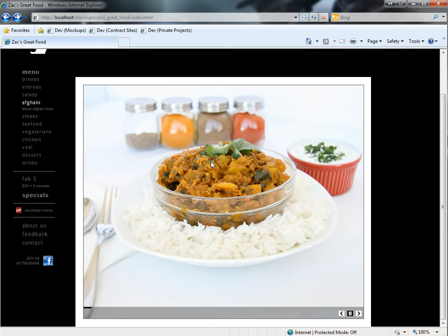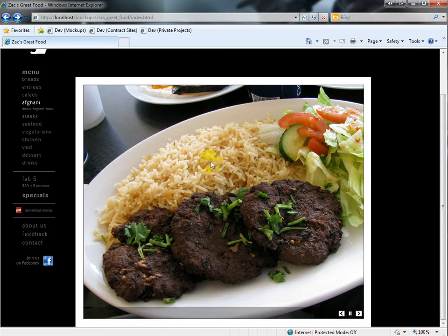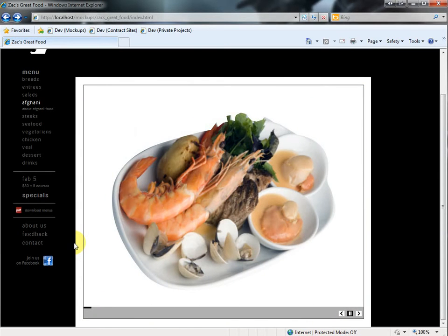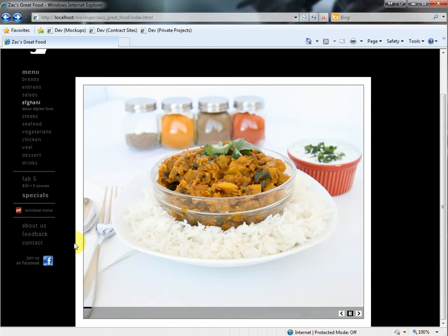And so it may happen that Ray says, "Oh, can you change this?" He might say, "Can I have a different Facebook icon?" Little things like that, 5-minute things, you just say yes. That's good customer service. If he's saying, "Can I have a new page, a gallery page?"